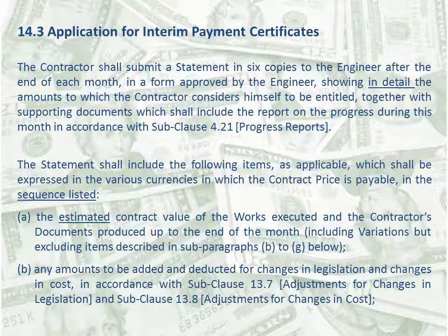And also there is no express provision for the statement to be signed by the contractor in FIDIC 99. It is important for the contractor to keep a record of delivery of the statement because subclause 14.7 needs the employer to make payment within 56 days from the date the engineer receives the statement and supporting documents. Therefore, there should be a record of delivery of the statement. And also, the statement must show in detail the amounts.